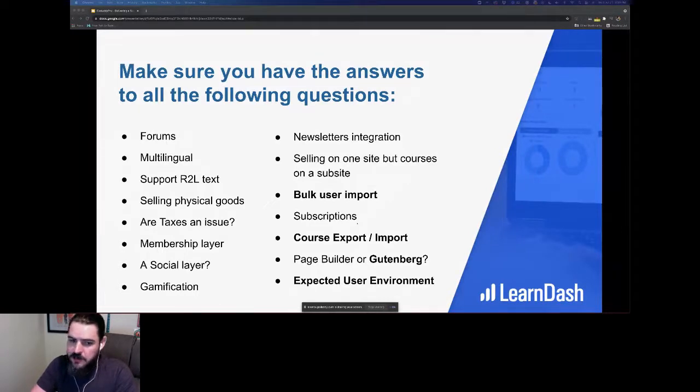Now, I do think it created a better user experience at the end and a lightweight platform, especially for the mobile-first experience I was talking about earlier, but that was not expected. I think doing an entire 30-page site with subsites on Gutenberg probably cost me an extra 2-3 weeks of unplanned time about a year ago. I think it would go much faster now, but it definitely was a lot.